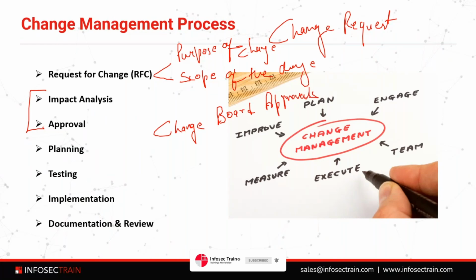Major changes are more likely to be managed as a dedicated project and require approval through a change advisory board, right? The role of the change advisory board is to assess both the business case and the technical merits and risk of the change plan. So the change advisory board should include stakeholders for departments, users, or customers who will be impacted by the change, as well as those proposing it, technicians who will be responsible for implementing it, and managers and directors who can authorize the budget, right?